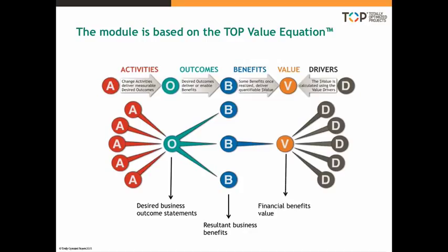And where those benefits are financial, you compute the financial benefits in a way that you can track that value, because the value is the least stable element of the value equation, because the value drivers, the financial benefit drivers, the bases and assumptions can change during the project. Therefore, it's important to know what has changed so you know what value is available at the time of realization.